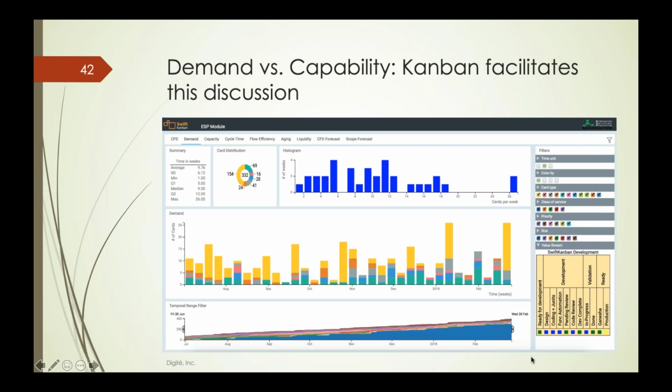The greater you're able to tackle things like dependencies and blockers on your board and reduce those, or to make sure that your teams finish what they started before taking up new things, those basic principles lead to some dramatic improvements in the delivery of your work.